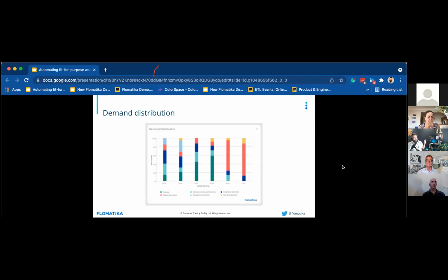Let's say, let's focus 60% of our capacity on this type of demand, 40% on that type of demand, or something like that. Obviously, that is not what will happen exactly. But if you know what the intent is, and we have a feedback loop to understand what is actually happening, we might use that to balance our decisions.